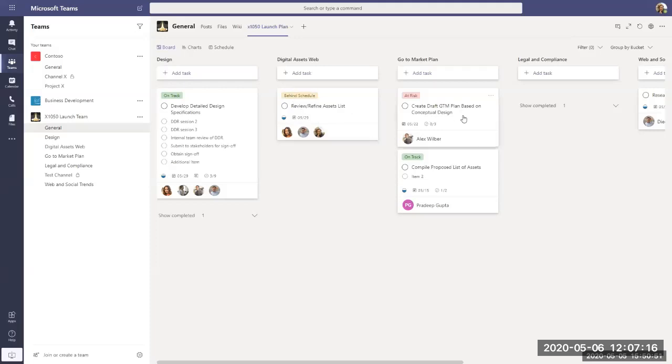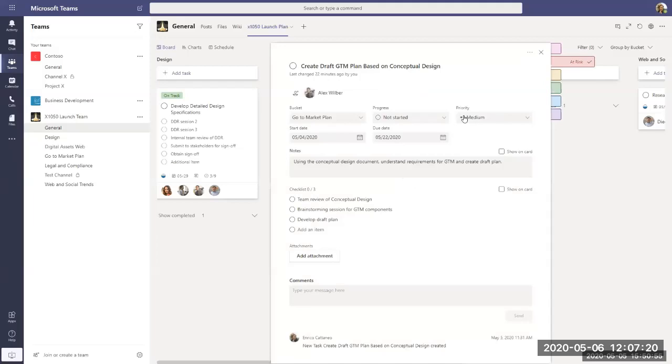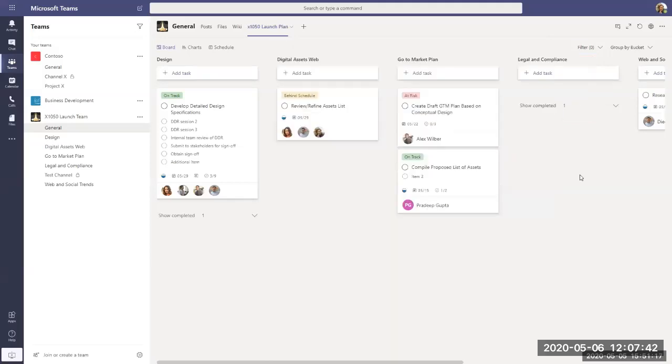This is something to keep in mind as well as you're trying to organize how you're managing the projects. On the right-hand side are all of these different labels that you can completely customize on a per-project basis. You can see some are labeled by color. They've just not been updated for the purpose of this demo. However, red was updated to at risk, yellow behind schedule, and green is on track. Very quick visual indicator to see what's going on within each of my tasks.